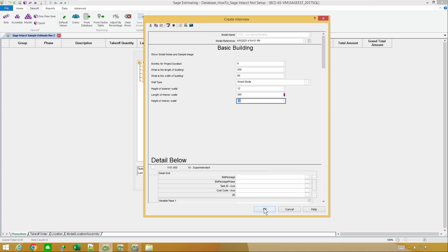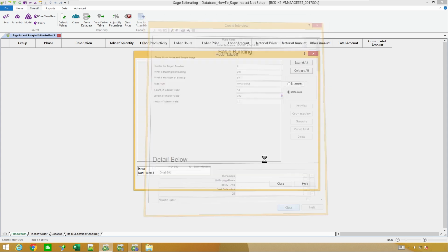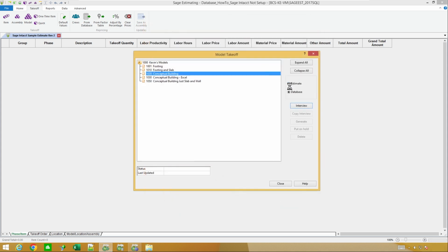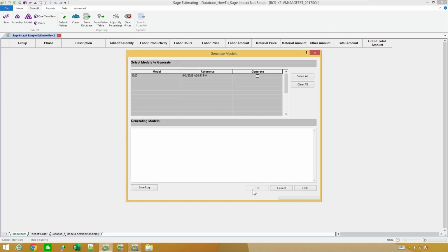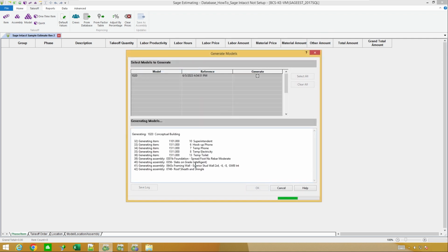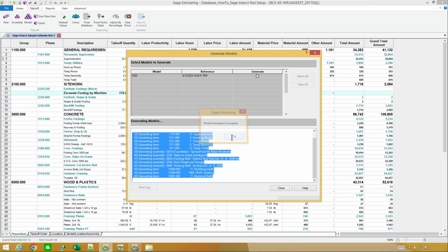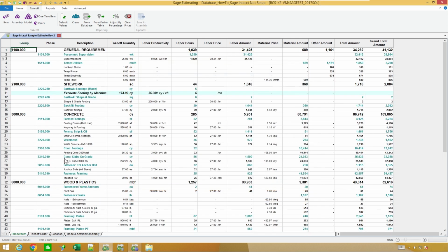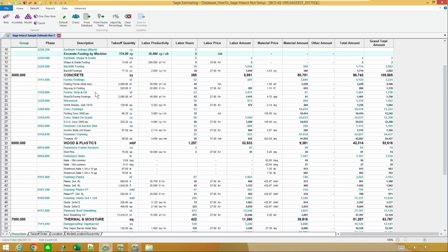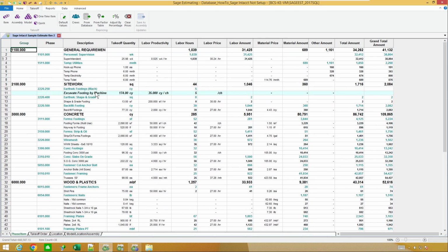If you don't know anything about assemblies, check out our YouTube channel. There's a couple videos out there, one on how to use models and another one on how to build them. So basically this model I just went through, it asked me a handful of questions. If I come back now and tell it to generate it for my estimate, it's going to go off and generate a handful of items and then a handful of assemblies to make up this estimate. So right here in a matter of a few seconds, I've got a pretty full-size estimate of at least some of the major sections of this project.